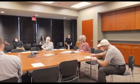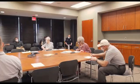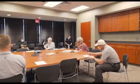Is that right, Bill? May I? Yeah. I think ideally, we would like to put this out for bids the first week in June. It gives us an opportunity to get into DRC and architectural review for a couple of weeks, and then hopefully if there are comments, and I'm sure there will be, then we can address those and put it on the street.